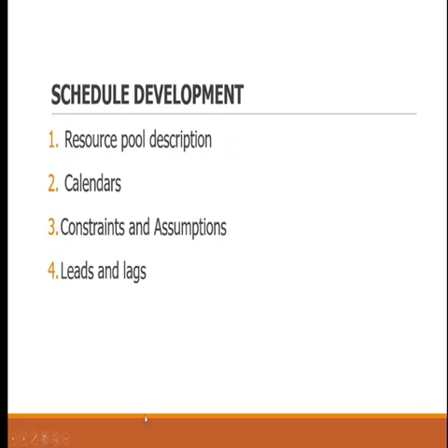Number 2, know your calendars. Your calendars are very important. Don't just do a schedule without knowing that the 25th of December is Christmas Day and 26th of December is Boxing Day, and it was on the same day you had to schedule an important project work. You will not get your stakeholders to attend. Somebody scheduled her wedding on a major election day and never knew that day was election day. The results are better experienced than imagined. So you must look at the calendar before you make a schedule.